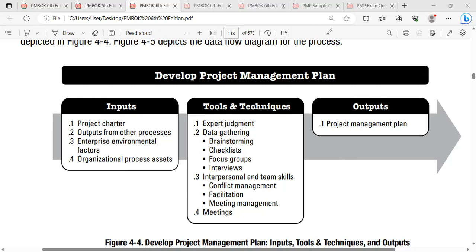The project charter's high level information should be transformed into detail level information. So the project charter should transform itself into a project scope statement. There should be a bridging process between the project charter process and the define scope statement process. The process name is called collect requirements, or gathering requirements. So you need to gather the complete requirements, and document them in a document called requirement documentation.